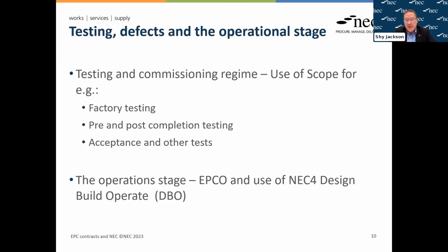The other key issue to think about when you're looking at this is that quite often this will require client cooperation or possibly cooperation from other parties, because you will need the client to deliver, say, the waste or the fuel that has to be used in order to carry out the commissioning process. And if you're also looking at the operator's role, who will take over the plant following completion, they sometimes get involved. So there's a bit of an interface question, and where it is dependent on a third party or the client, as Peter said before, that's the sort of thing that you would put in the program so that everybody has clarity as to when that is required and the effect of it not being delivered on completion.